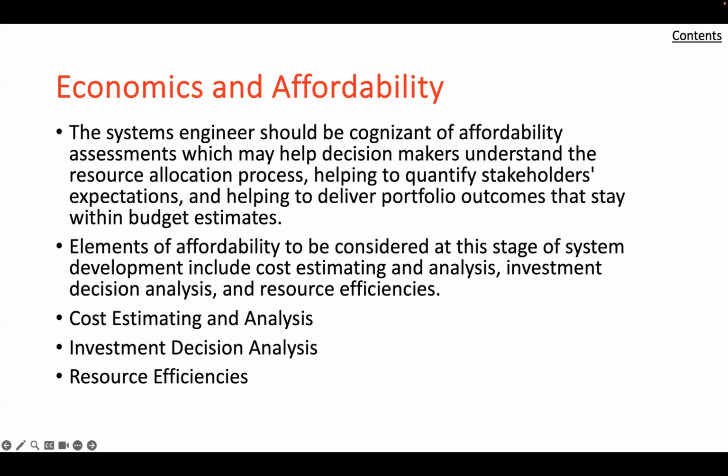The R&D costs include all program R&D equipment, personnel, facilities, and testing. The production costs include procurement of the initial materials to produce a system, the manufacturing facility, the labor force and training, spares, and any pre-planned product improvements.